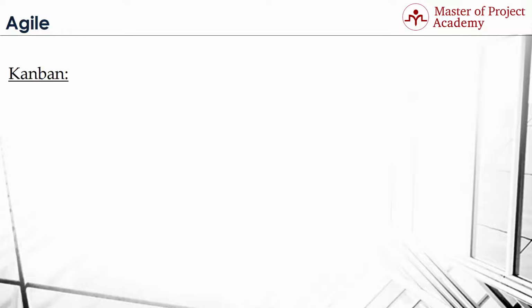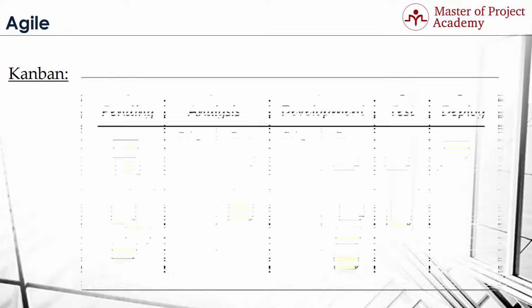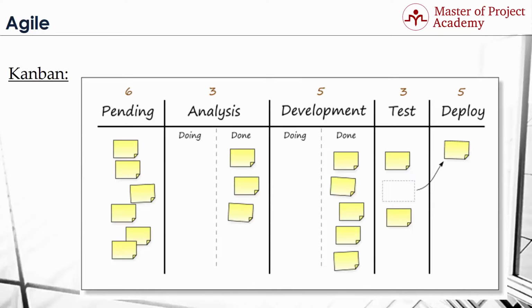In its simplest incarnation, a Kanban system consists of a big board on the wall with cards or sticky notes placed in columns with numbers at the top. The cards represent work items as they flow through the development process, represented by the columns. The numbers at the top of each column are limits on the number of cards allowed in each column.